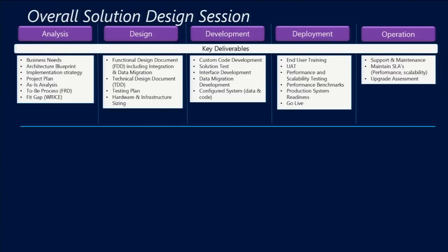Okay. I also, at this stage, from the design standpoint, would like to see a testing plan, understanding what UAT is, and understanding how, looking at those functional design docs, we are going to test the solution to meet the customer's needs. It's highly important that I like to add the testing plan as part of the functional design document. You'd be surprised how often that piece is one or two sentences within the document, but it's a very important piece that should be just as important as the design itself.